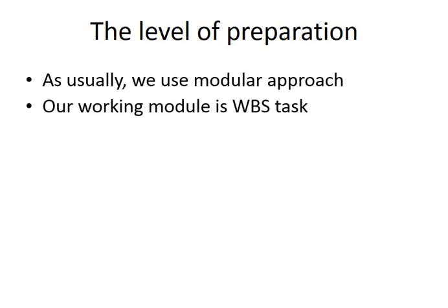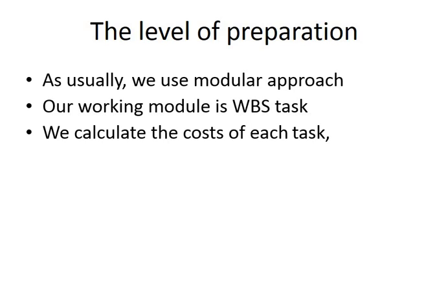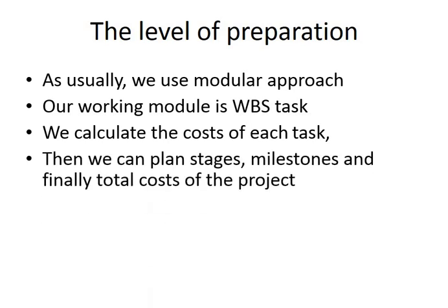We need to prepare the descriptions of the tasks, and based on the tasks coming from WBS, we can later prepare the cost estimation. So we deal with tasks. Then we can sum up everything. In the end, we get the total cost of the project.